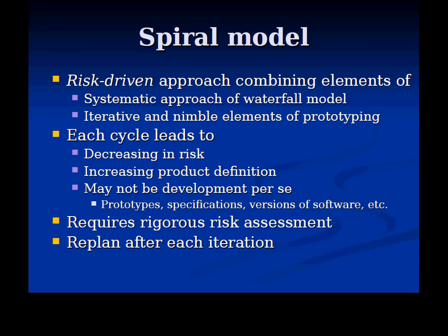Or you discover that they have duplicated code after a couple months of work, right? Discover the technologies are incompatible, whatever. The point is that if you can do the integration on an ongoing basis and actually sync it up, get it stable, robust, do the testing, do the peer reviews, you're in a much more confident, resilient, robust condition than if you just leave it to all be put together after a couple months.